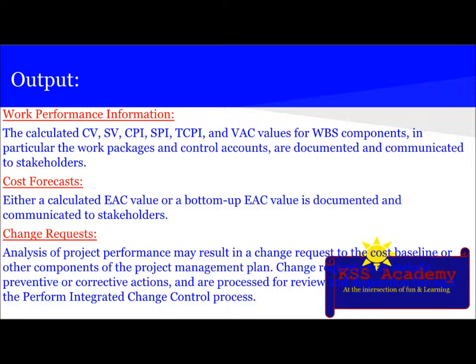Then the change request: analysis of the project performance may result in a change request to the cost baseline or other components of the project management plan. Change requests may include preventive or corrective actions and are processed for review and disposition through the perform integrated change control process.